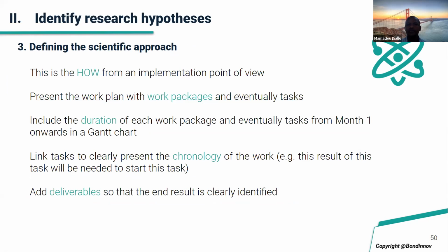Present the work plan with work packages and eventually tasks, including the duration of each work package and task, from month 1 onward in a Gantt chart. I think we already talked about the Gantt chart, otherwise maybe we will show it later. Link tasks to clearly present the chronology of the work.